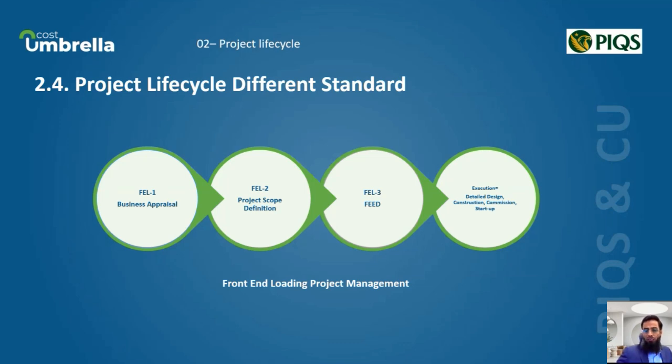In this stage, which is also known as the pre-feasibility stage, the question we are looking to answer is: is the project worth it? We define the project's objective, do some initial study to get the lay of the land, and importantly, identify the major risks. The result is a go or no-go recommendation.